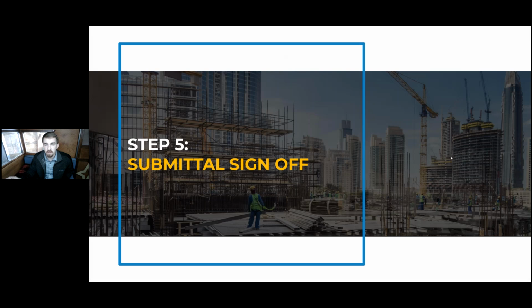So after we've detailed all the control sequences and decided how our control is going to interface with our heat pumps, as well as selected all the equipment we want in our system, now it's time for the part that everyone loves the most, which is the submittal sign-off. There's often some back and forth, especially if there's alternate equipment proposed based on local availability or lead times or anything like that. But it's worth doing your due diligence through the submittal process to make sure that it moves seamlessly downstream of this.